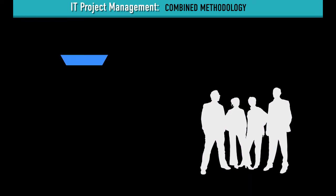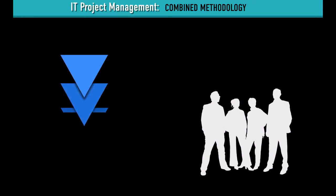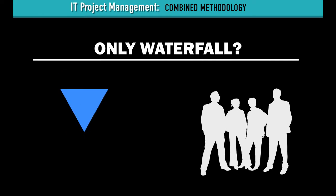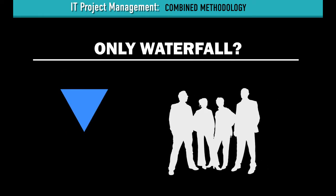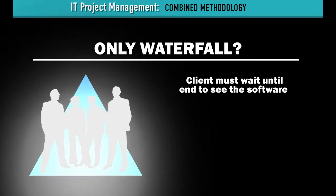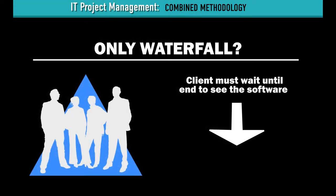If your team only used the traditional Waterfall methodology, Daisy and her clients would have to wait until the end for the finalized software. This could cause her several weeks of continued scheduling mix-ups.